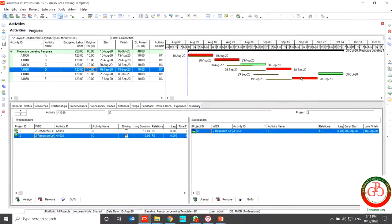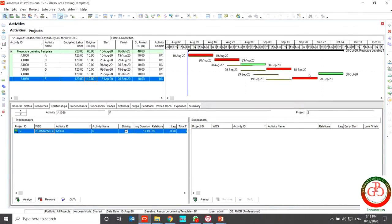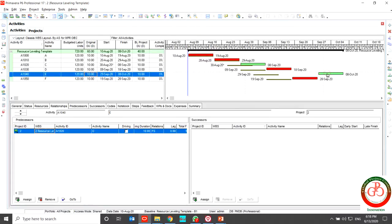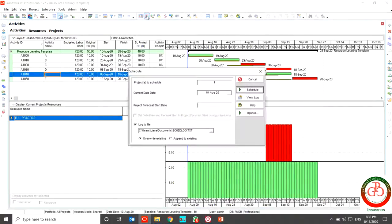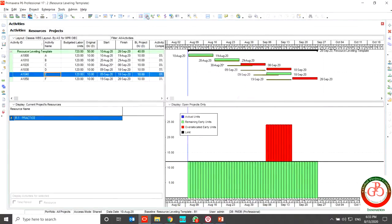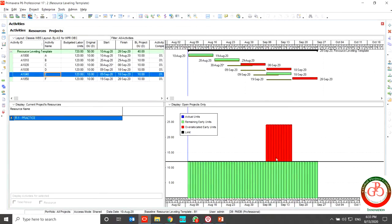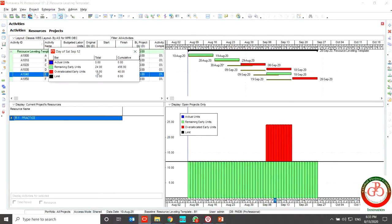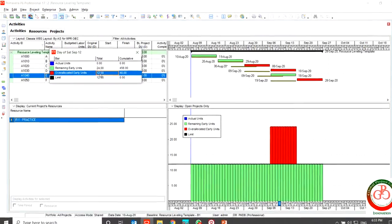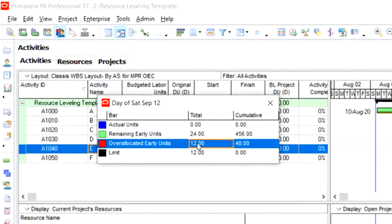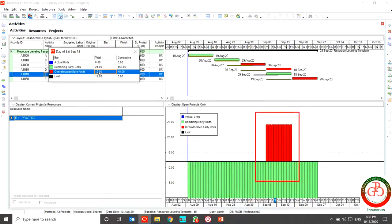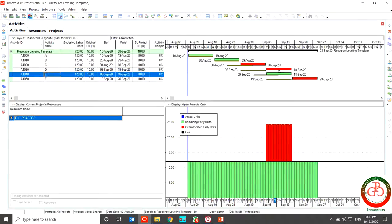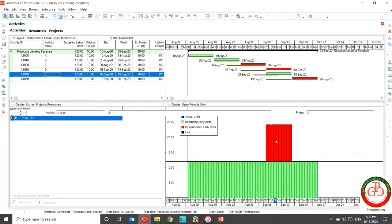But what about E and F? Let me use the schedule. This is the schedule result of the project. I have another overallocation. This overallocation about 20 hours per day. I have overallocation in my project, about 12 hours per day. So I want to use solution number three to solve this overallocation.